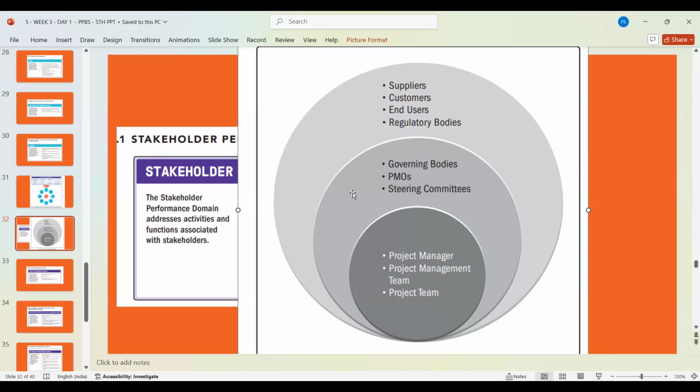If you are a PMO for a particular department, a particular segment, a particular vertical, then for all the projects under that department, no matter how many they are, you should have their details: start date and end date, the budget, the timelines, the current status, are they lagging behind? If the project is not as per the timelines, why is it not? If more budget is being utilized, why is it utilized? At least these major pain points, or even highlights and achievements, have to be known to you.